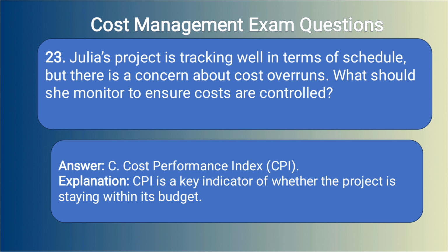Answer: C. Cost Performance Index, CPI. Explanation: CPI is a key indicator of whether the project is staying within its budget.